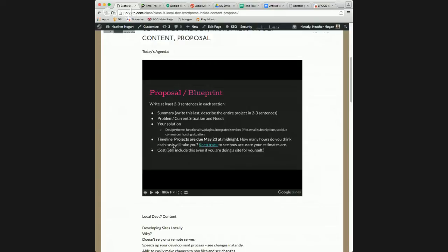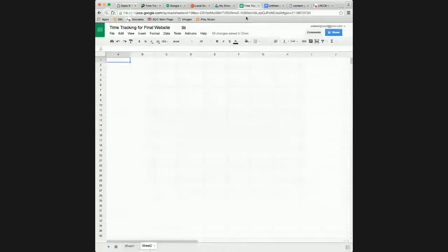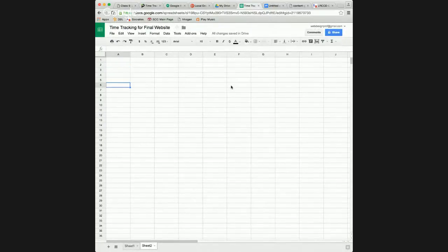So I know the project's going to be 6 weeks, and I'm going to meet with the client for at least 30 minutes once a week. So I list a line for admin, project management basically, and it's going to be 6 weeks times 0.5 hours.